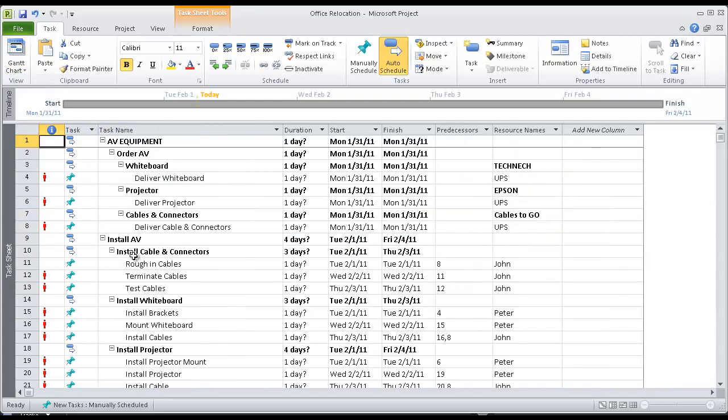Once you get to this point, you can now begin to add durations to your activities. As we saw before, the default is 1 day. Go through and, from the case study, add the durations that you found in the various pieces of communication. If you don't have a specified time, do not make one up. Use the discussion board to ask a vendor or staff for input.